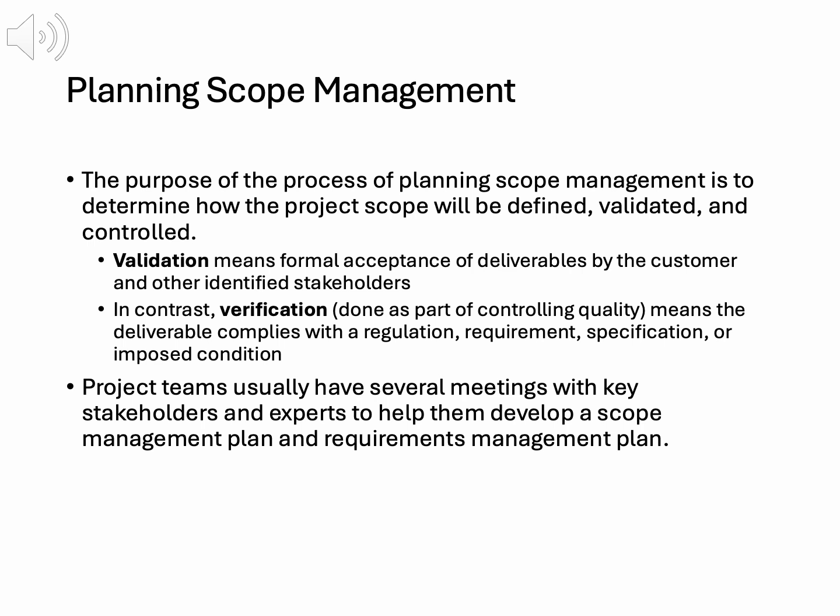Obtaining acceptance of deliverables involves stakeholder sign-off, ensuring alignment. Controlling change requests ensures only approved changes are implemented, maintaining project focus. These processes require collaboration with stakeholders and experts. For example, the training project team might meet with HR and IT to define course requirements, ensuring the scope management plan reflects their needs. These meetings clarify expectations and prevent misunderstandings, like assuming unneeded courses are included.